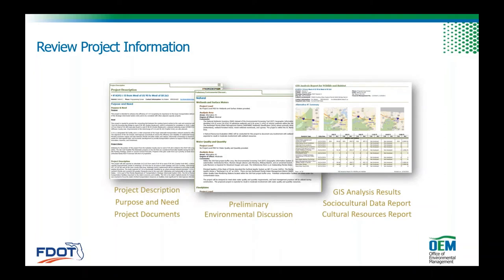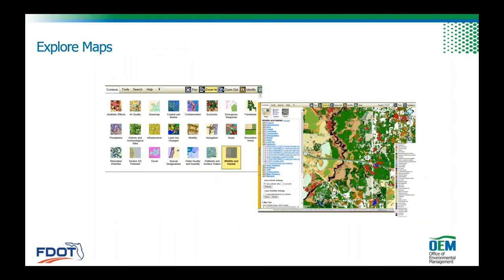There's also a lot of GIS analysis reports. There's hundreds and hundreds of layers that have been provided by these agencies, and they told us how they wanted us to perform analysis, so that when we had line work and it was going to be within a specific buffer distance, or it was going to intersect with something, they wanted the results to be shot out so that the things they cared about would be very visible to them.